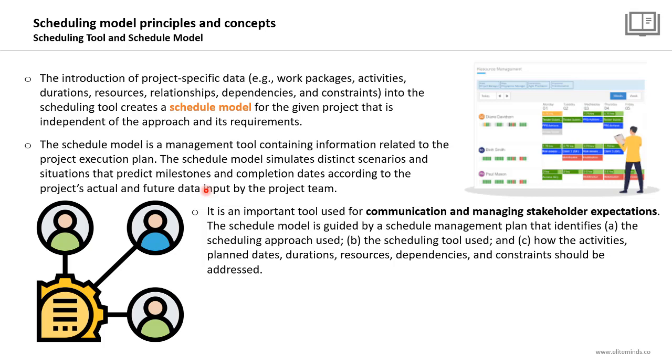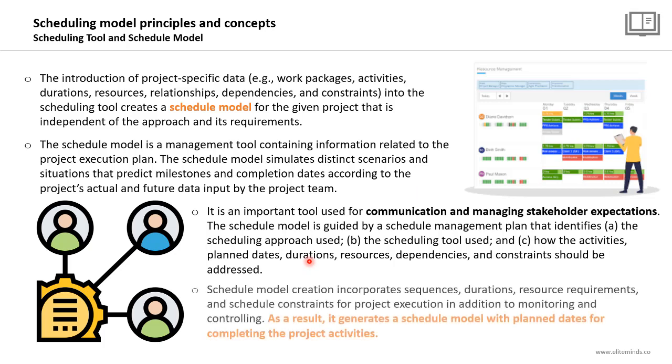The schedule model is guided by a schedule management plan that will identify the scheduling approach, the scheduling tool, how the activities, plan dates, durations, resources, dependencies, and constraints will be addressed. This information will be part of the schedule management plan that will support you as a scheduler in developing the schedule model, and the schedule model will be a great tool to facilitate communication and engagement with the stakeholders of the project.